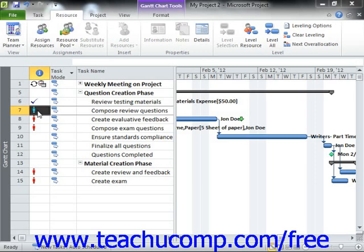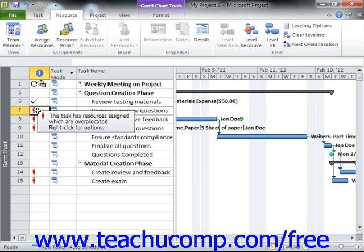As we saw in the previous lesson, you can use the resource usage view of your project file to examine resource allocation. You can also make manual adjustments to the over-allocated work resources in order to ensure that they remain fully allocated based on the units of work available. In addition to manually correcting over-allocated resources,